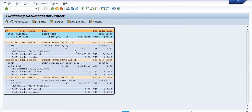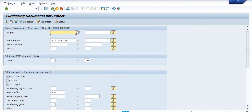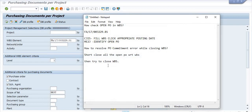One purchase order is 100% open for invoicing — that is why I am getting the error while closing the WBS. The remedy is to either short-close this open purchase order or 100% invoice it before closing the WBS. Before closing, first short-close the open purchase order, then try to close the WBS and you will not get this error. The open quantity creates a commitment for this WBS, which causes the purchase order commitment error.